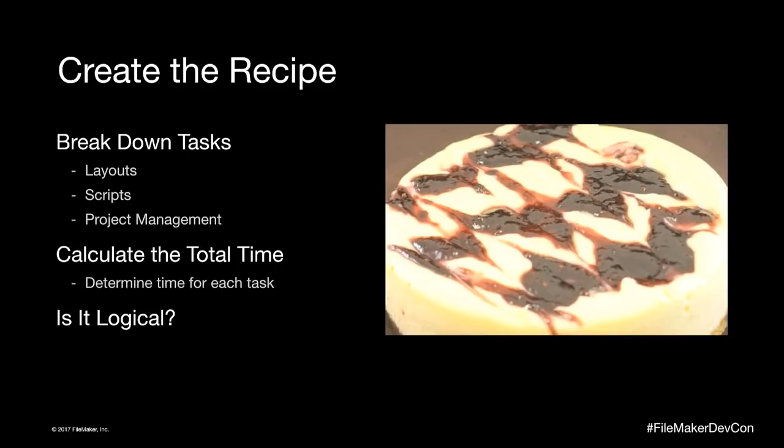So the other thing is, when I'm doing the breakdown, I do the Mercedes. I put in everything the client wants, all the bells and whistles, all the comforts, and that's way more than they wanted to spend. And then I make it a Toyota Yaris. Hey, they're both good cars. I don't know anything about either car. I don't drive a Mercedes and I don't drive a Yaris. The idea is that they're both good cars, they're both reliable, but one just has a lot more bells and whistles. So I always start with the client telling me their druthers, I throw them all in there, and then at that point I have to decide. Because maybe you do want to present everything to them and say, hey, let's break it out into phases.